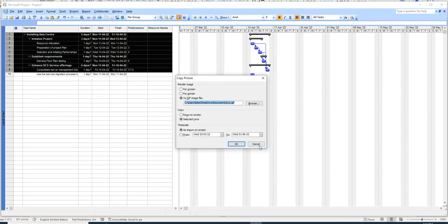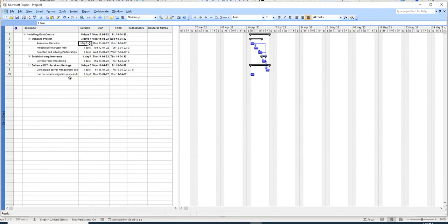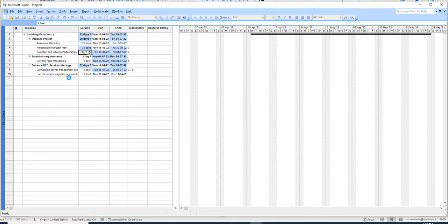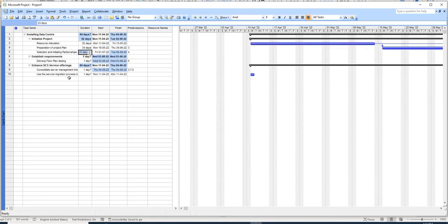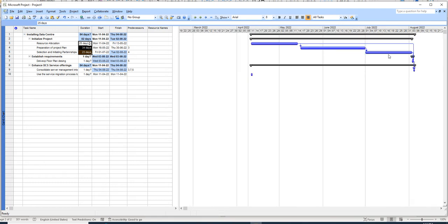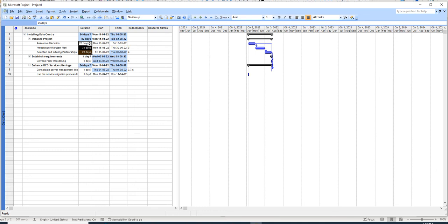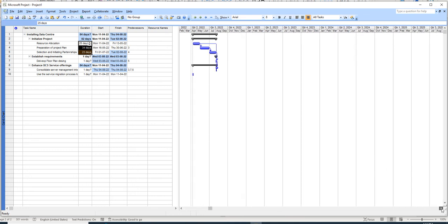One more thing we have to do is update the days and duration based on your understanding and expectation. You just give numbers before you paste your data. The date should be given to the subtasks, not to milestones and not to the main activity. When we give time, it automatically increases the length of the bars, so make sure you readjust it to normal size. You can press control and scroll up or down to reduce the size of this image. So just add the number of days to this activity and finish this one.